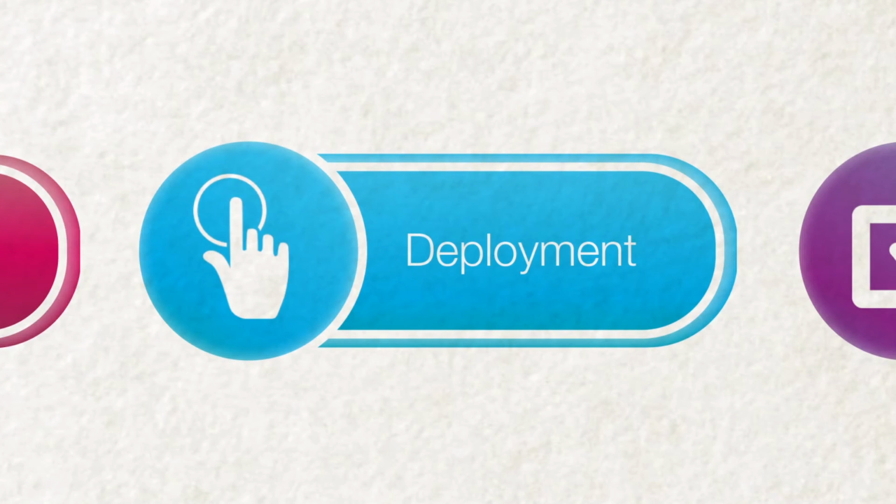The next phase of the project would be the development. This is where we build and test the environment of the new solution for the customer. Included in this are customizations that meet the customer's requirements, any type of data conversion, and third-party integration. All of this is brought into one environment for the customer to test and examine and to make sure that this meets their needs. This is done through a pilot design phase where we'll sit with the customer and walk through each of their business processes, looking at their requirements, making sure that they're met, looking at reports and data integrity.